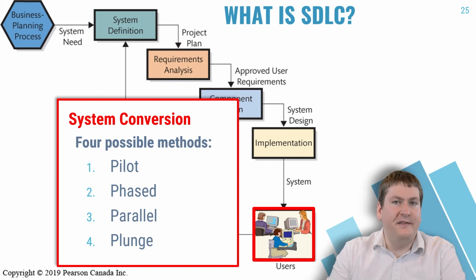The next strategy is phased. In this method, the new system is installed in phases, one component at a time. After a phase is complete, time is given for users to encounter issues, and the results to be evaluated. This continues until the whole system is implemented. The advantage again is the risk is reduced by limiting the number of systems that are changed at once, and users are allowed to slowly become accustomed to them. The downside is that it's not possible for tightly integrated systems that cannot be easily broken into parts or phases.